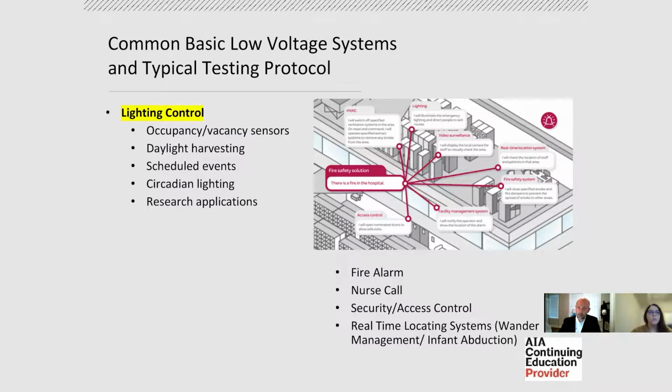But it's a complicated lighting control scheme that a lot of healthcare environments use, where the light level, just the intensity of the light, and the spectrum and the color temperature and your cumulative daily exposure are all tracked very carefully and controlled and managed for the benefit of patients and staff. And in those instances, that's where there'll be a lot of Q&A on the site. You may not have enough information in the design to really test the system and make sure that it works. So that's a cooperative one. There'll be a lot of interaction with the technician.